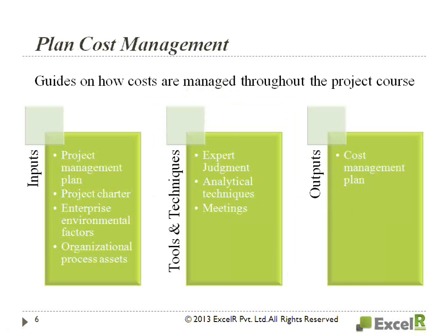Now we'll see plan cost management. So it's an identical process where in every knowledge area you'll be producing a plan. So here also you'll produce a cost management plan. So for this, what are the inputs you require to plan your cost management primarily? So as I told you before, here you will establish the policies related to the cost management, what are the procedures and the documentation for planning, managing, expending, controlling project costs, reporting.